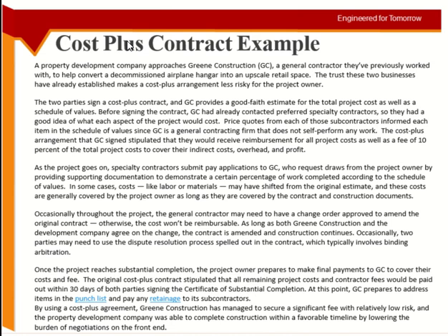Within 30 days of that, the client will pay the full fee, and it will also give a certificate to the client that the work is done. They have already prepared a checklist of what items are to be done, and once that list is filled, that is considered as complete. And there is a retainage amount as well for the subcontractors.